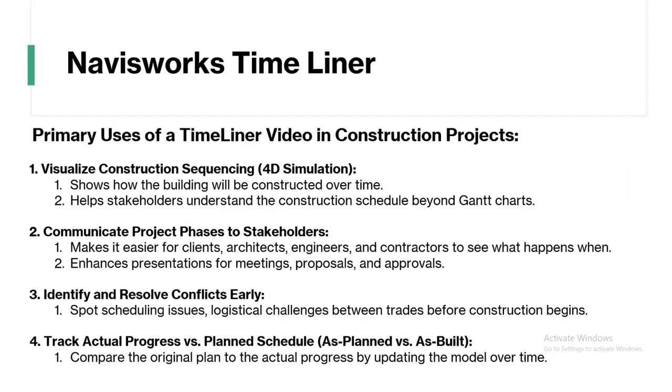Primary uses of a Timeliner video in a construction project can include visualizing construction sequencing, or 4D simulation, that shows how the building will be constructed over time and helps stakeholders understand the construction schedule beyond Gantt charts.